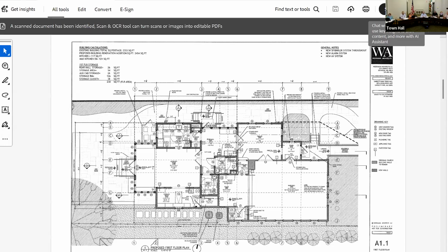Thank you. So Greg, I may have missed this. Do we have a sense of what that water line might add to our budget? Unfortunately, according to our civil engineering consultant, a 4-inch line coming off of the street requires an underground vault on your property, which is extremely expensive. It is for that reason that he is proposing to have a hydrant added in front of the building, which he says is less expensive. Because you raised that question before, and that is the explanation that I have gotten.